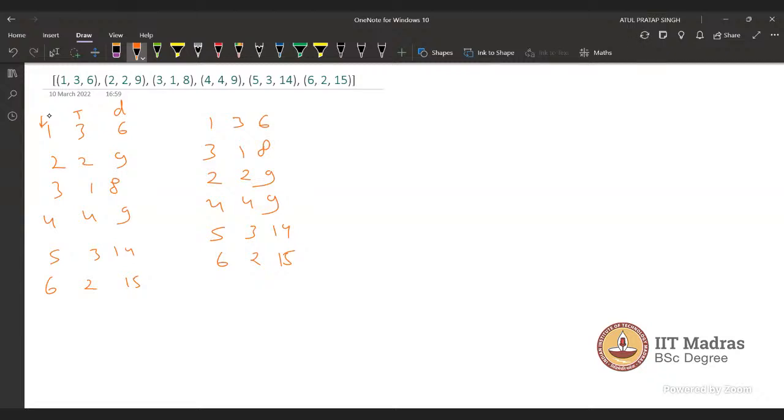So after that we will check and select the time. So we will start from 0, and we will select the first activity, it takes 3 time. Now the ending time is 3. Okay, and the deadline for this is 6, and we are completing this before the deadline, so lateness will be 0 for that.